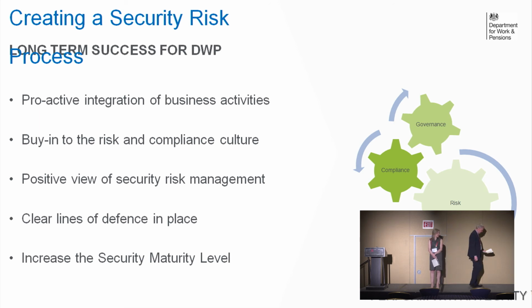It's been mentioned here around First Line. First Line didn't have mature risks, so further work had to be undertaken on that. So we've had constant lessons learned going on all of the time, and having that accountability and responsibility within First Line now is proving a challenge. The adoption and the culture is proving to be a challenge for ourselves, but it's something that we are overcoming. We're escalating where necessary, and more risks are being onboarded and updated, but it's still a massive challenge. As was mentioned, we're almost 3 years into it now. It's a 3 to 5 year implementation, and it does take 5 years. Going from Excel spreadsheets, Word documents and PowerPoint to a software solution is a really massive challenge that can't be underestimated.